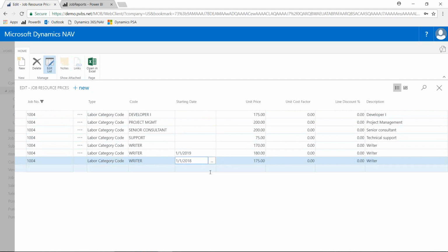This date can also be any day of the month. It doesn't need to be the 1st of the month. It could be the 5th of the month, 7th of the month. It doesn't need to be at the beginning of your timesheet cycle. For folks, oftentimes this is an area, if you have T&M work, that people do manually, because systems sometimes can't support this idea of a rate change in the middle of a timesheet period. What the system will do is bring in hours at both rates if people work across that period. So you don't have to worry about making changes offline or just billing the lower rate because of a system limitation. Any of these screens, you can open them up in Excel, and you can actually enter data in Excel and refresh it back if needed.